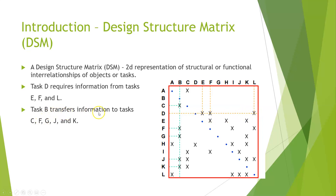Task B transfers information to tasks C, F, G, J, and K, meaning those tasks depend on task B. So if we go to column B you see an X on C, F, G, J, and K. This is a visual representation of task dependencies — it's pretty much a design structure matrix.